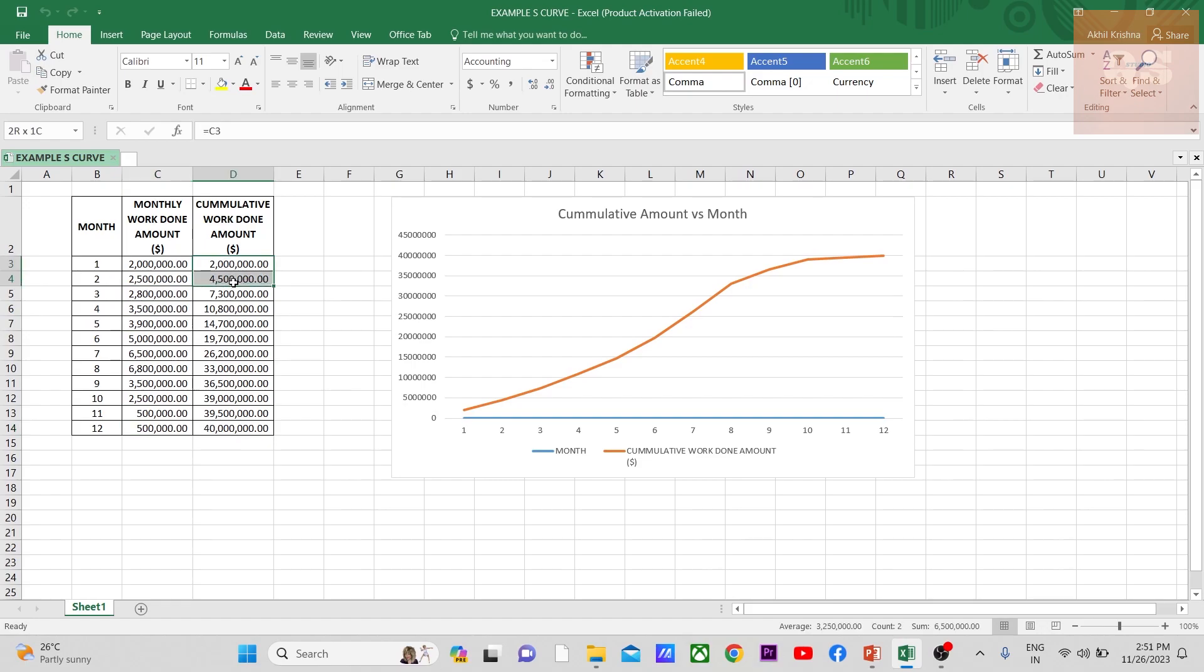Initially it will be 2 million, then second month it will be 2.5, then 2.8, and it goes on till the last month. If you see here, this is the cumulative amount. Cumulative means in the first month it will be 2 million, second month it will be the cumulative of the first and second, so 2 plus 2.5, that is 4.5.